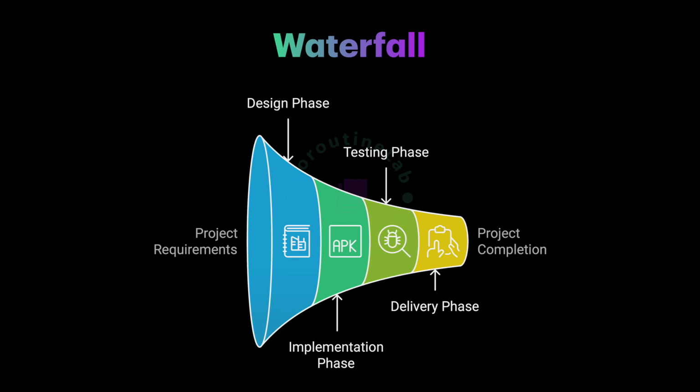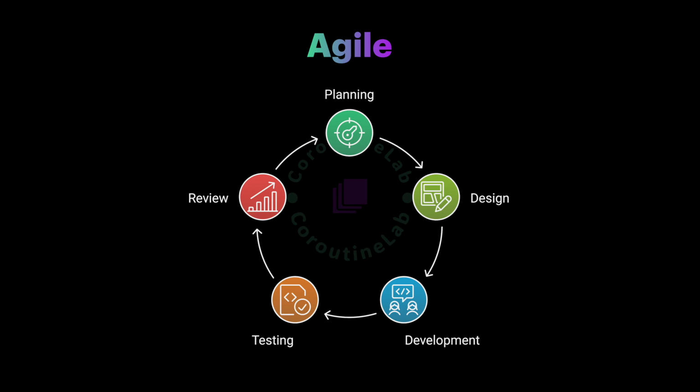While practical, this approach has some major challenges. It is inflexible to any change in requirements, making it difficult to accommodate new changes. Testing, on the other hand, happens after the implementation, which could delay the discovery of significant bugs. Agile, on the other hand, is an iterative and incremental approach that overcomes the inflexibility with feedback loops.